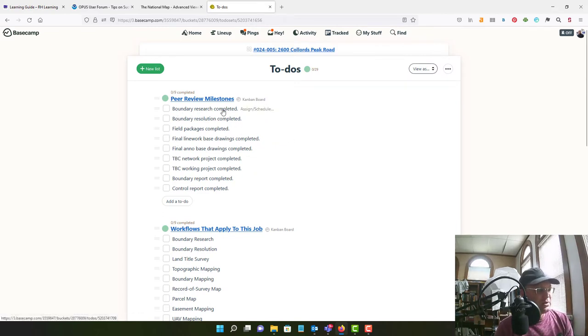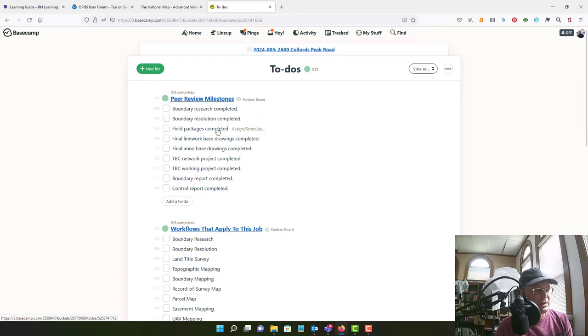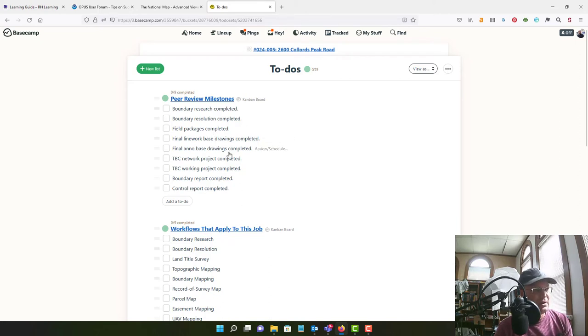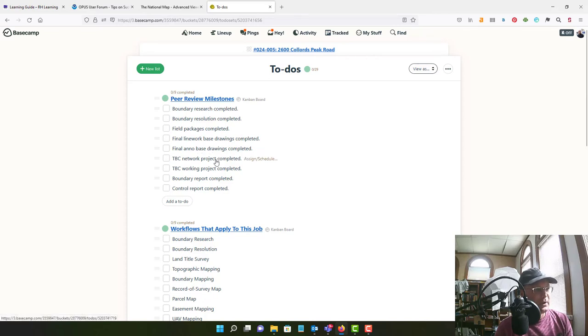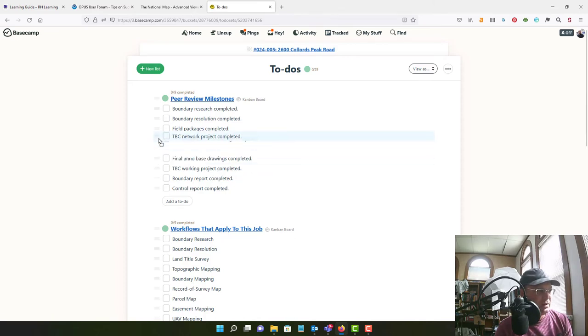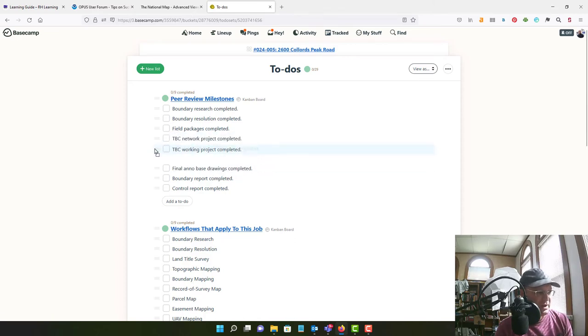We are going to need to do boundary research. We are going to need to resolve boundaries. We are going to need to do field work so we will need field packages. We are going to need line work based drawings. We're going to need Anno based drawings. We are going to, because we're doing field work, we're going to need a TBC network project and a working project. And I should move these up so they're kind of in order.